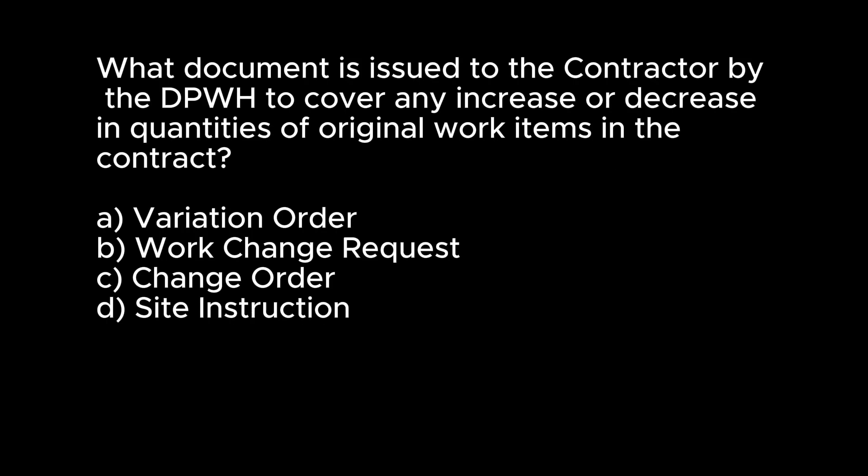What document is issued to the contractor by the DPWH to cover any increase or decrease in quantities of original work items in the contract? A. Variation order. B. Work change request. C. Change order. D. Site instruction. Answer: C. Change order.